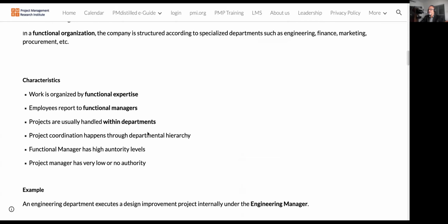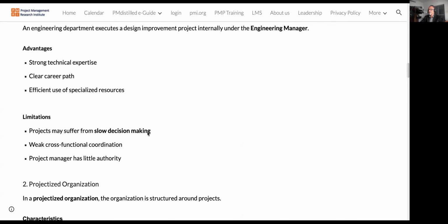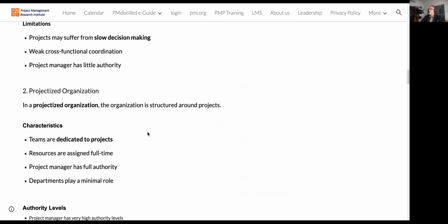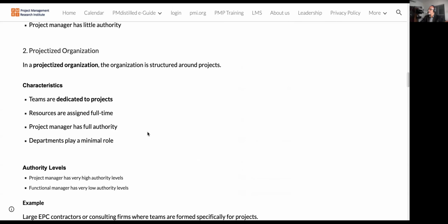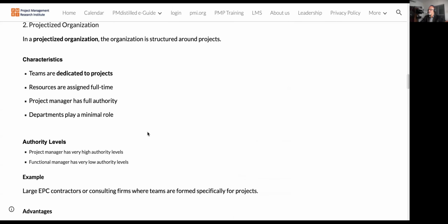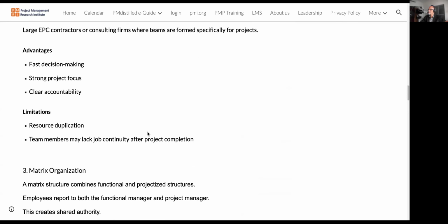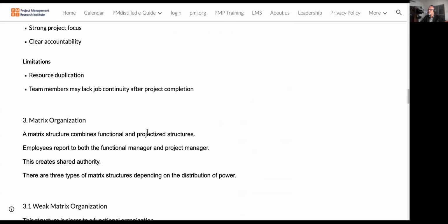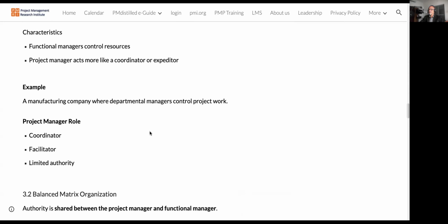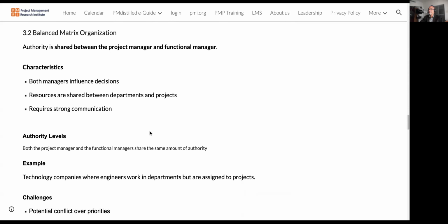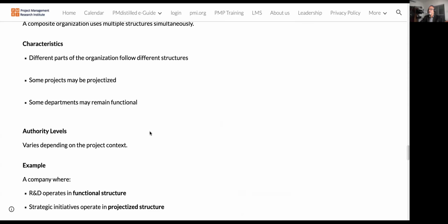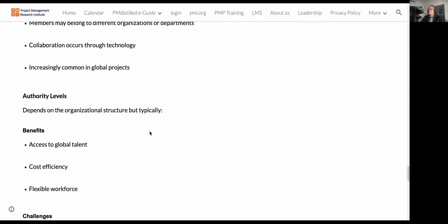If we can understand the organization structures of all the stakeholders of the project, then we can be more efficient while doing the stakeholder classification based on power and interest. Power of the stakeholder to influence the project, and the interest of the stakeholder in the project.